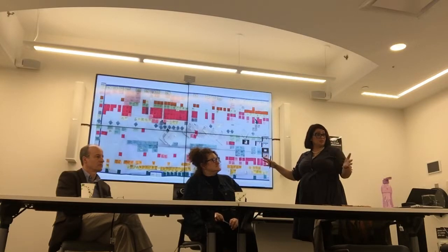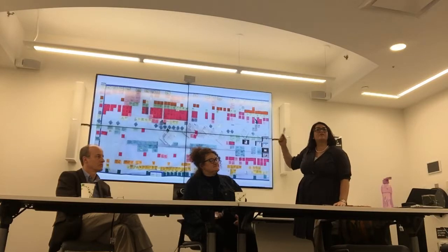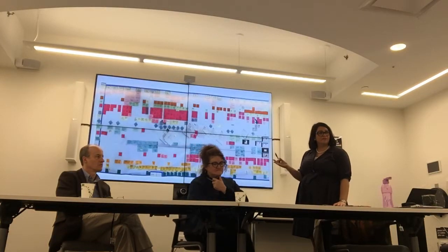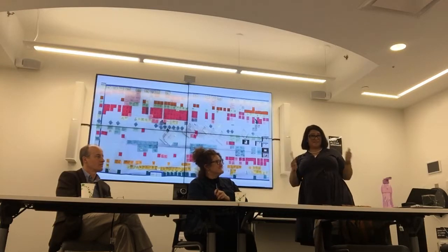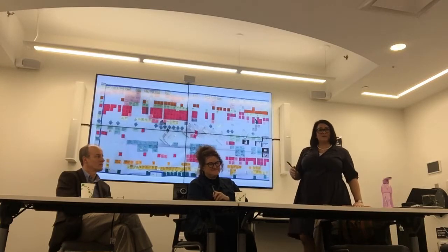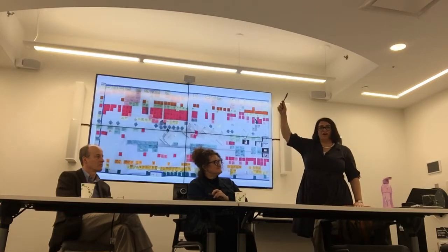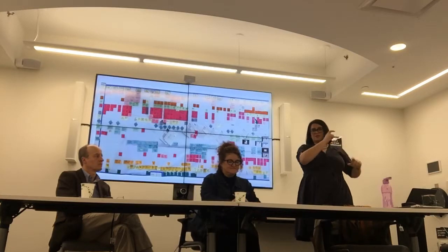As much as the technology was really great too, understanding this picture, we had a list of every experiment that we wanted to run, and therefore we had, in Agile terms, what's known as a product backlog. We could prioritise it based on desirability, viability, feasibility, so that as soon as our friends in the Department of Treasury and Department of Justice gave us the green light through funding or whatever, we knew exactly how much we could do. So if they gave us, for example, $5 million, we could do this much. Another five, this much, and so on and so forth.